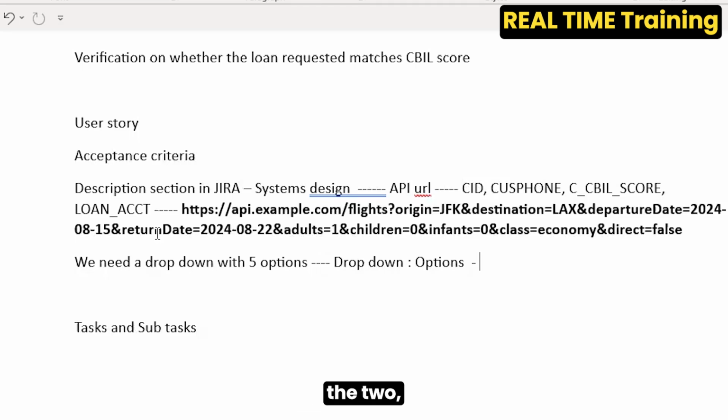Let's divide it into 8 and 5. We'll divide the story into 2. Tell me what you will be covering in this sprint and what you will be covering in the next sprint. Divide the user story, and change the language in the user story so that I can hold you accountable for this sprint on what you have to do.